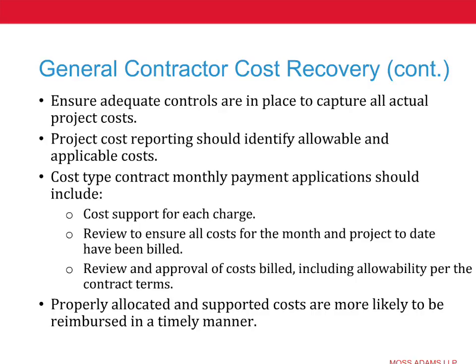And if you're on a federal project, the allowable costs are going to be subject to the Federal Acquisition Regulations, and the allocable costs are going to be subject to the Federal Cost Accounting Standards, and that's a whole other level of rigor that's going to be important, because you won't get reimbursed from the federal government on cost reimbursable contracts without an adequate understanding of which costs are allowable and which costs are allocable per federal rules. And recognizing that the federal government doesn't allow certain types of costs that businesses normally incur as they do business, you have to consider that as you're setting your profit and considering the risk associated with the project.